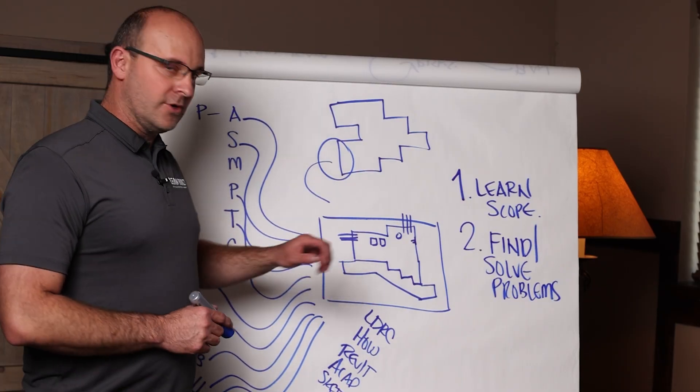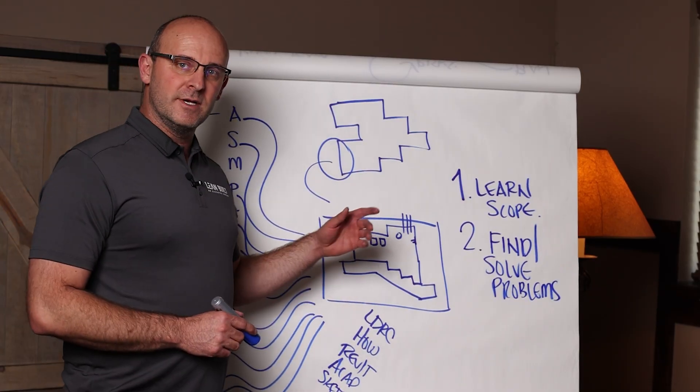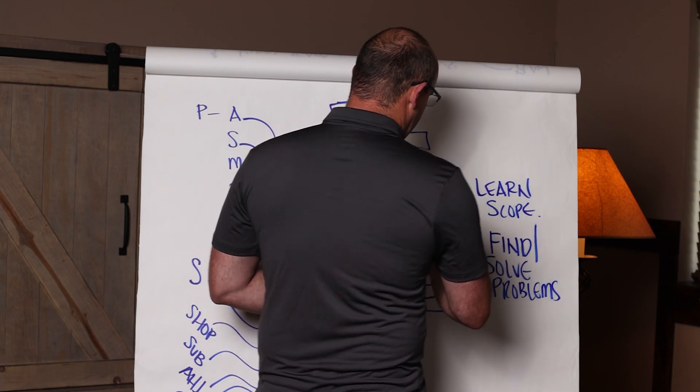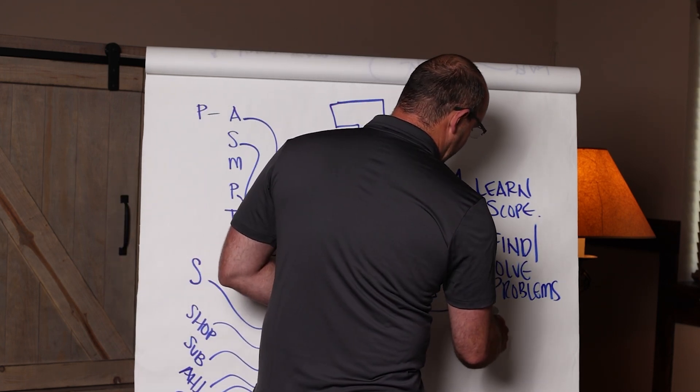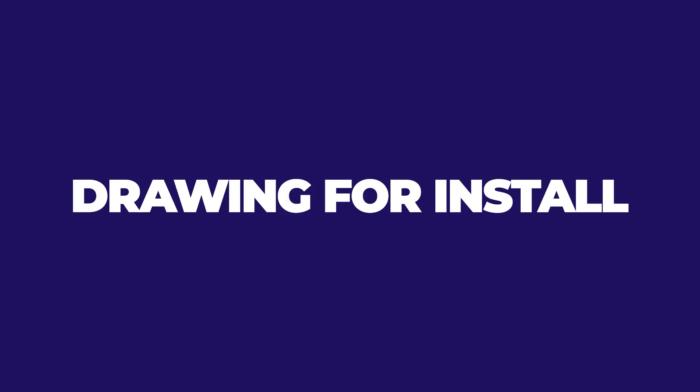If we don't have enough information to draw it, we're not going to have enough information to build it. So when you're actually creating the lift drawing, you're finding and solving problems. And then number three, you have a drawing for install.